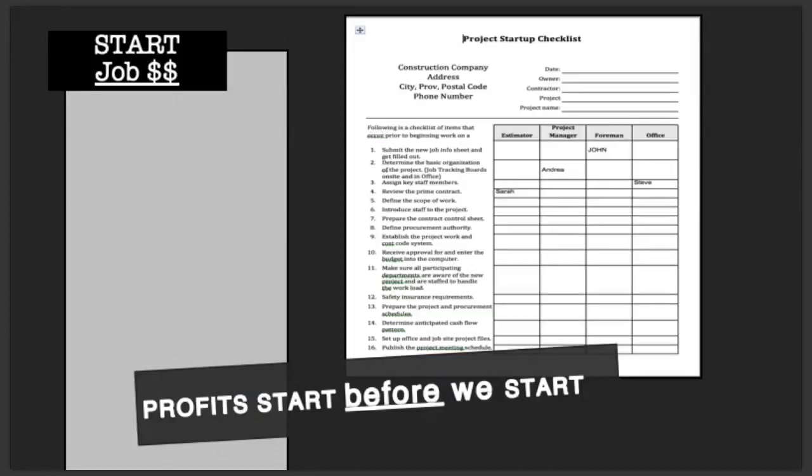And I want to tell you guys a really great line I heard on Friday from one of our senior members, John Shirtliff. He's in Napanee, Ontario. And he had a great line about this. He said, break-even margin is the amount of money you need to make no money. Okay, so he'd been quoting at 35% for like 25 years. His break-even margin was 33%. So it doesn't take a mathematician to realize he wasn't really making any money. And shockingly, he never had any cash flow. He's always struggling to pay his bills. He couldn't really live the life he wanted.